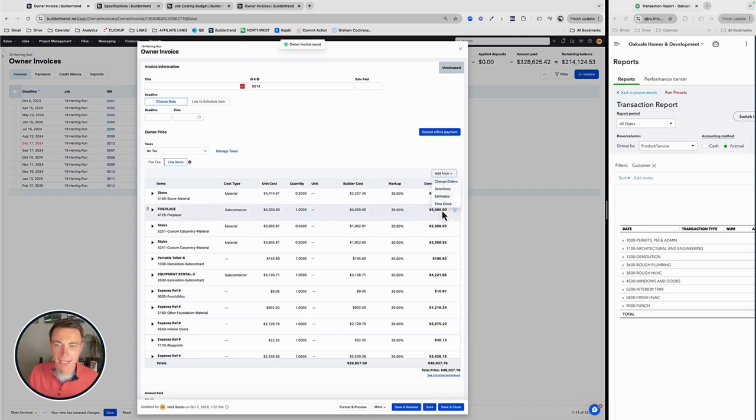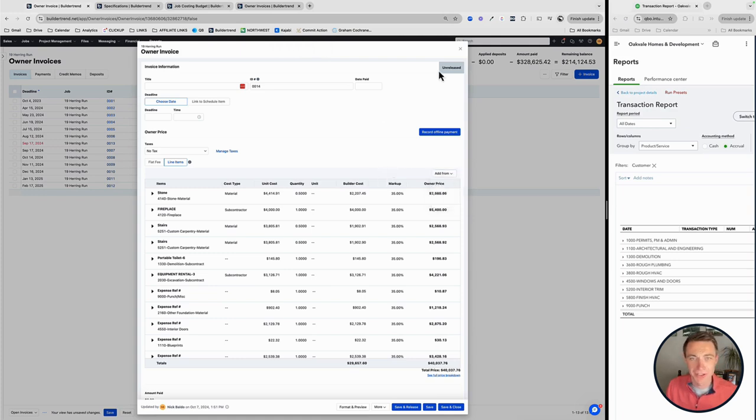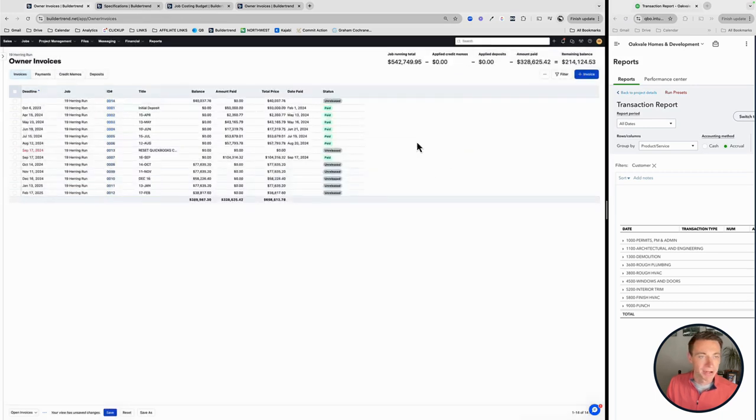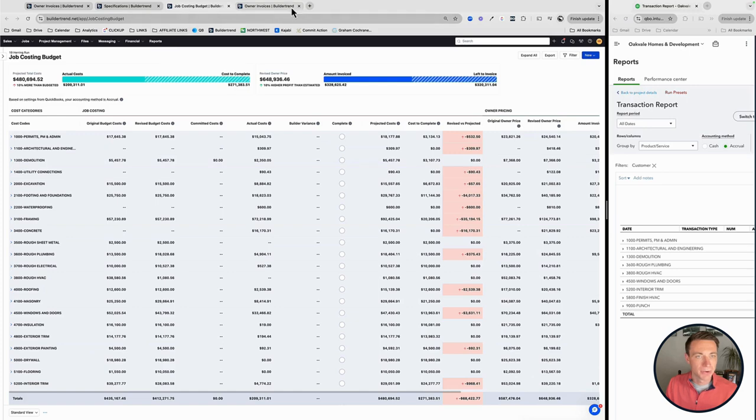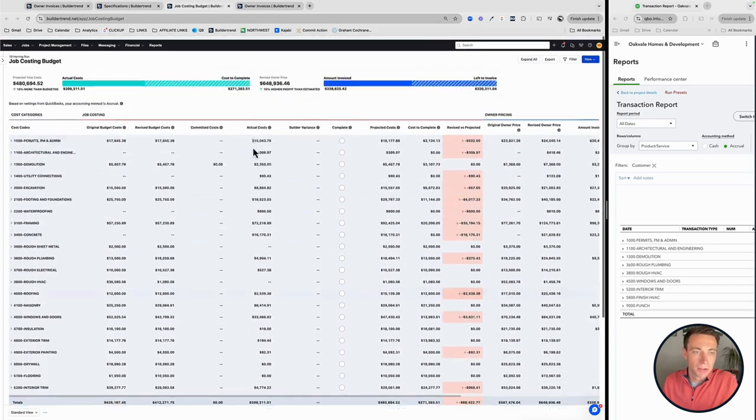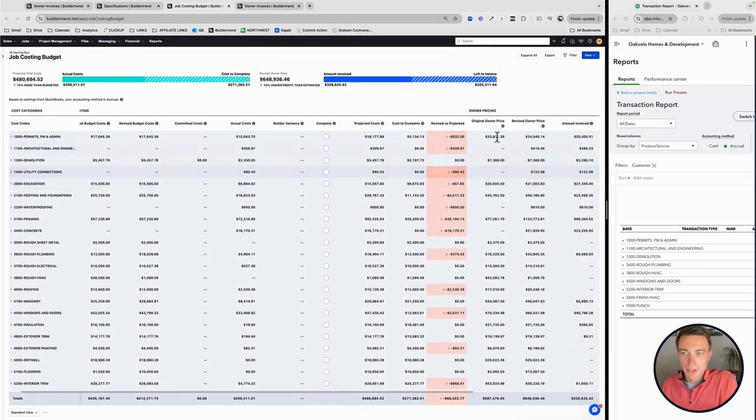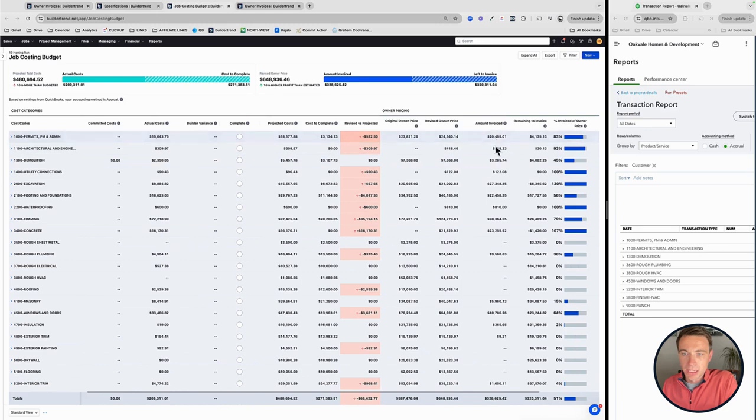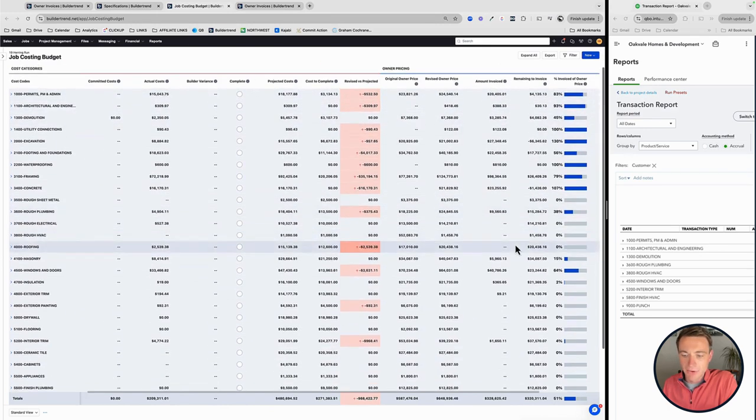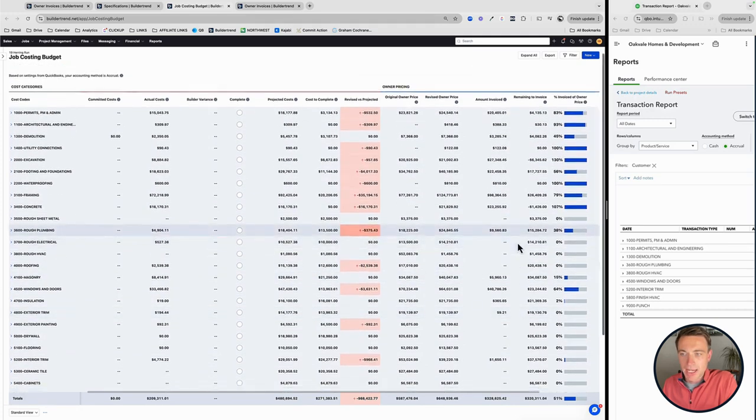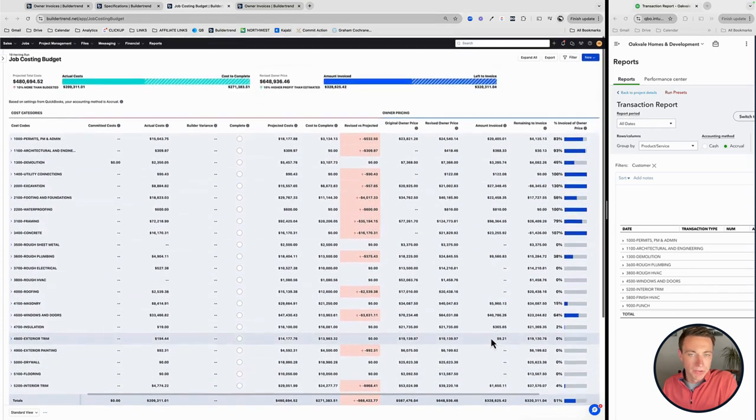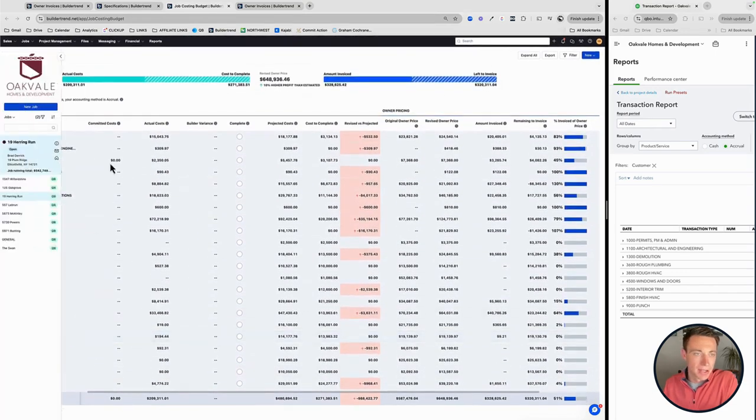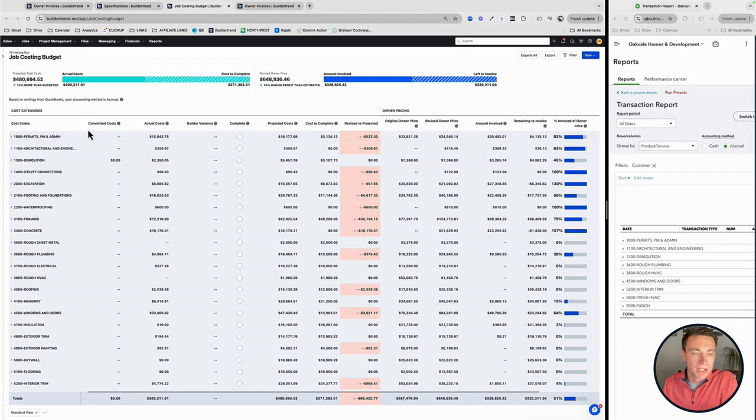Now I'm going to add from the time clock in a second. I'm not going to use this project because this is a real live project with real life human beings. And I don't want to publish their names and hours and rates and everything on the internet. So what I'm going to do is I'm going to go to a different one over here. Actually before I do, it's over here. I just want to show you the job costing, what we can do with this. The reason it's so valuable is when we mark items as billable, it helps us to indicate an amount invoice versus our revised. So remaining the invoice could potentially help the customer understand where we're at when it comes to how much more to expect. Now you have to have your job costing and your estimate really locked in for that, which is a topic for another video.